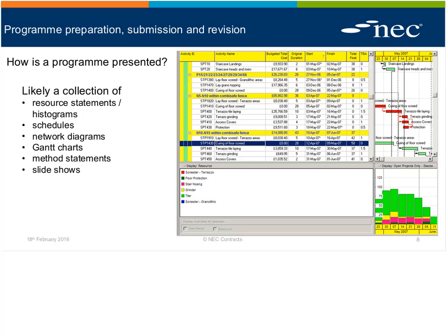I don't know if this is off topic, but a top tip, well worth specifying in your works information: if you can only use a particular programming package, I shan't mention it by name, then you need to specify that in your works information. Otherwise, you may end up with program submissions that are perfectly compliant, but in the wrong format. So if you have a particular desire for the program to be formatted in a given way, best to make that clear in the works information.